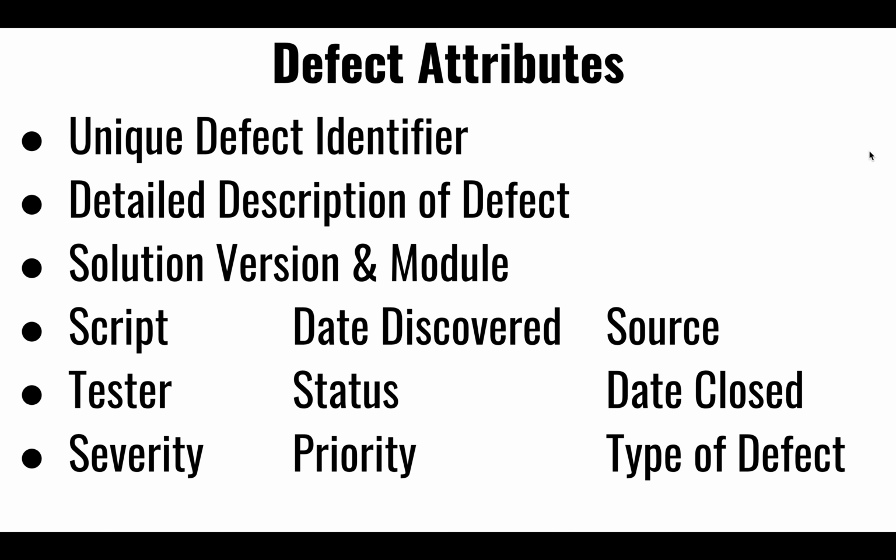There might even be sprints, depending on how many bugs and how much technical debt we have been accumulating, where we only do bug fixes and say we're not going to implement any new features until we empty out all the bugs. Oftentimes we refer to these as a hardening sprint. We're going to harden what's already implemented and pay down any technical debt that we have been accruing throughout several sprints.